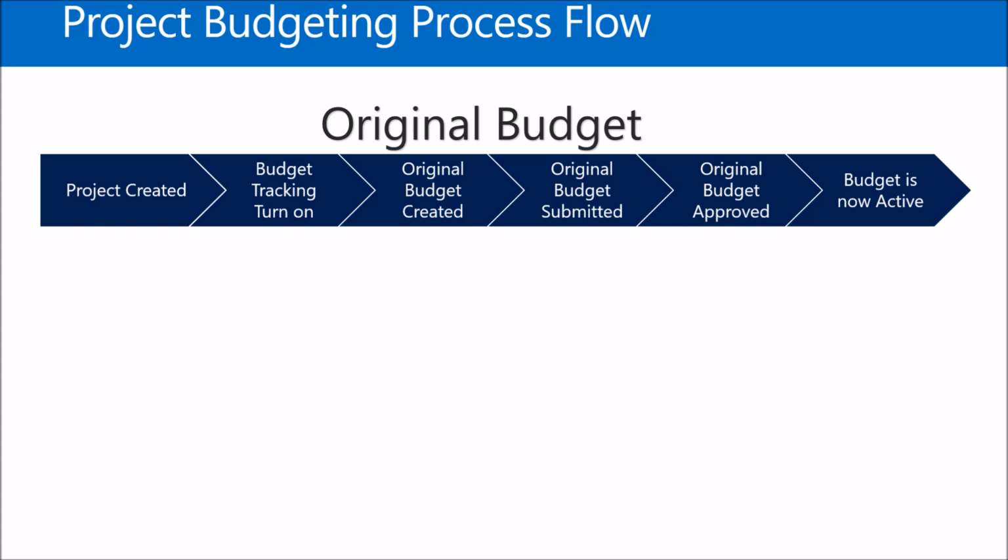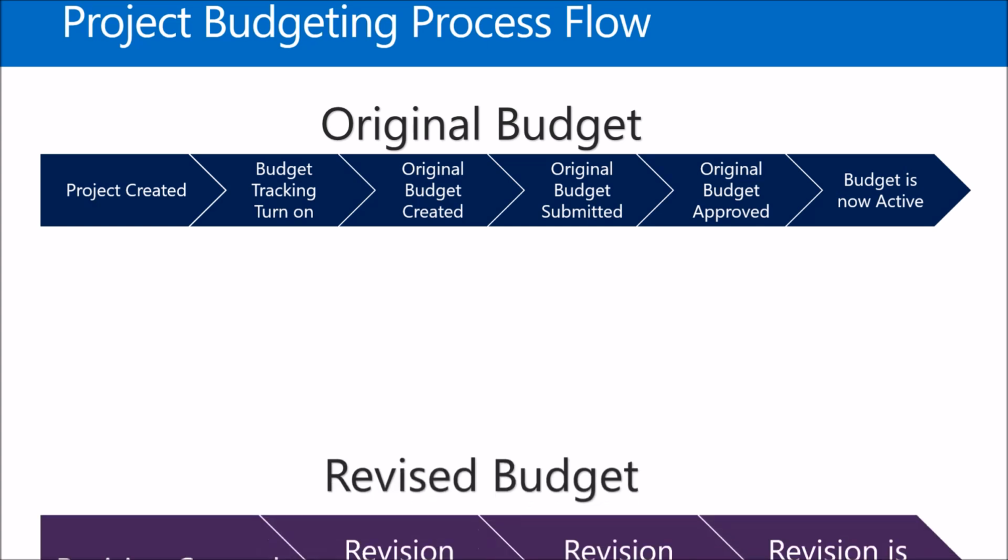Anytime you're logging any actuals, the system tracks those actuals towards the budget, and you can have the system tell you you're over budget, either as a warning or a hard stop, or not even caring. You have a budget in there, and the system's not going to tell you whether you're over budget or not unless you run a report and manually take a look.